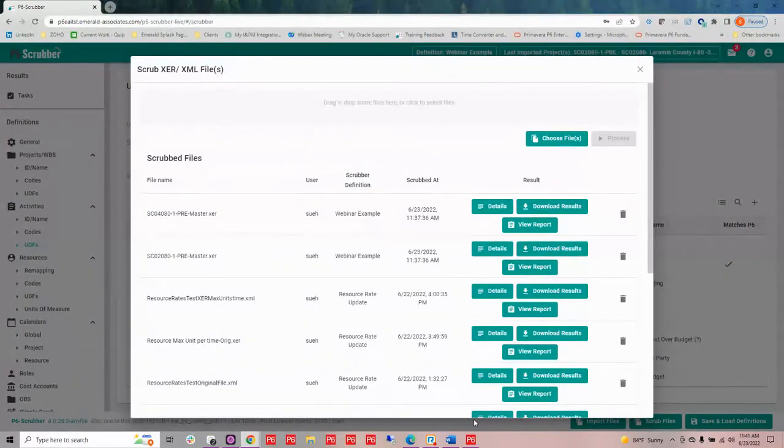We keep saying when you're receiving a file, but if you're a contractor and you have to give a file to the engineering group that's going to review it, or your client, and there's stuff you don't want them to have because you don't need to share that information, for example, resources or costs, because it's a lump sum job and you don't have to provide that detail.